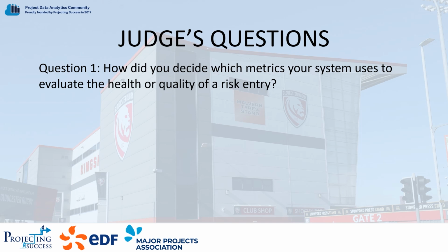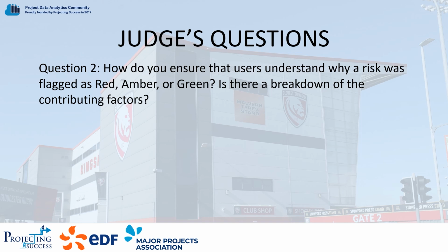On RAG status, we continued to use the criticality H1, H2, H3 in the data provided, assuming this was input by the user when creating and updating the risk. To be used in other industries, H1 would be red, H2 amber, H3 green.